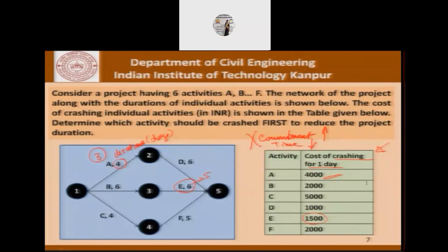This cannot be done. There may be minimum times for any of these activities beyond which, no matter how we crash it, it will not work. So there is a minimum time which is required, there is a reasonable time which we are willing to give, and beyond that reasonable time, yes, it is possible to reduce it to that minimum time by putting in additional resources. So this is the backdrop of carrying out this exercise.